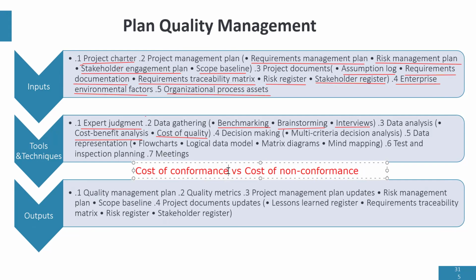Because they did not pay attention to the cost of conformance by doing a soil test, they're now going to pay for cost of non-conformance, because if the foundation is wrong, the house might begin to sink or tilt to one side, and the cost of non-conformance will be the money you spend to repair that defect.